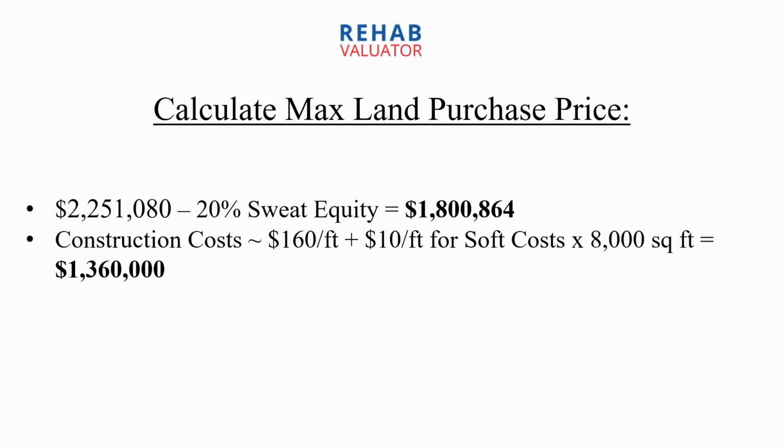And then I'm going to subtract out my construction costs, my hard costs and my soft costs. So I'm using here a total of $170 a foot, but every market is different. Construction costs are changing rapidly. Ever since COVID, construction costs have been changing and rising rapidly. So don't just take the number that I'm using in this case study at face value. Research what things cost in your market. Talk to other local developers that are building similar projects. Talk to general contractors that are building these types of projects and find out what things cost.